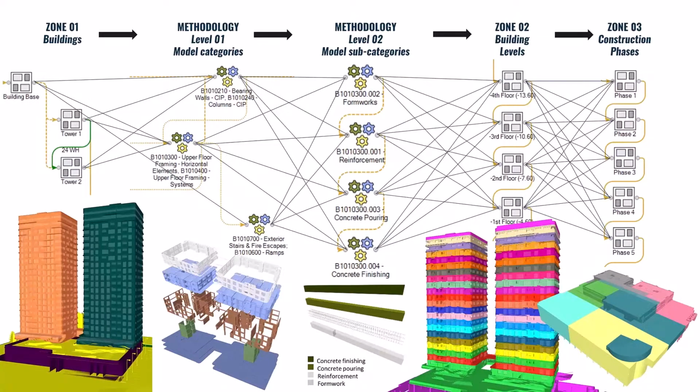On the other side, we have methodological work sequence definition. Here we define functional groups of works and their relations. Once the methodology is created, it can be used in the future for the same or similar project type, with small or without any modifications. The main goal is to automate the process of schedule creation using project-specific zones on one side and the methodology on the other side. Combining them in BEXEL Manager, the schedule will be automatically created.